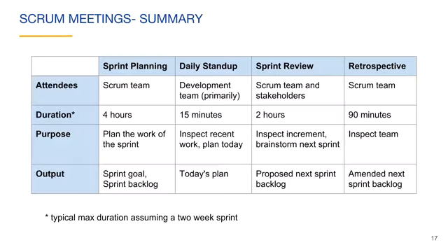Here's a summary of the 4 meetings related to a sprint. It's important to always make sure that the meetings have high value, and the team should focus on continuously improving their meetings. Notice that the next sprint goal and sprint backlog start to form in the sprint review. The retrospective usually adds one or more issues. This forms the starting sprint backlog for the sprint planning meeting.